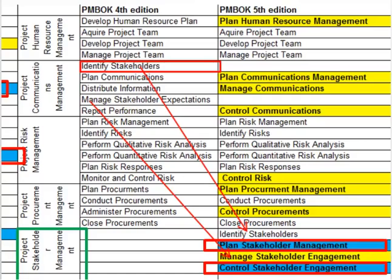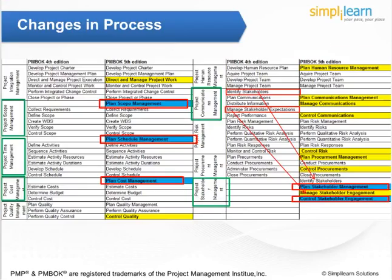The processes Identify Stakeholders and Manage Stakeholder Expectations have been moved from Project Communications Management to Project Stakeholder Management. Manage Stakeholder Expectations has been renamed as Manage Stakeholder Engagement. These are shown with red arrows. Finally, process names are modified to maintain consistency, which are highlighted in yellow. The next slide shows how processes are embedded between knowledge areas and process groups.